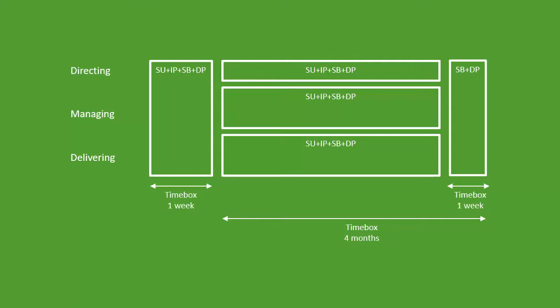They're doing a retro, they're planning the next iteration sprint, and then they keep going like that in a cadence. So a lot of planning would happen here on the team level when they plan the next iteration / sprint. And of course they keep track of their work using burn down charts or burn up charts. They got information radiators, people walking by can see how they're doing. All of that is going on the team level.